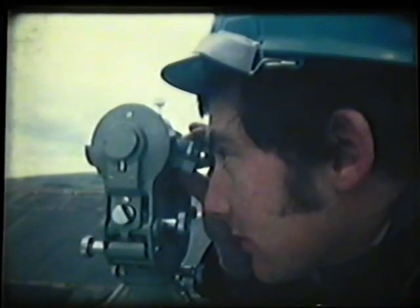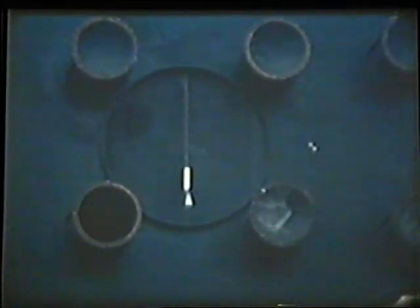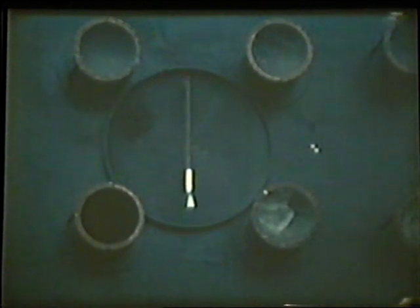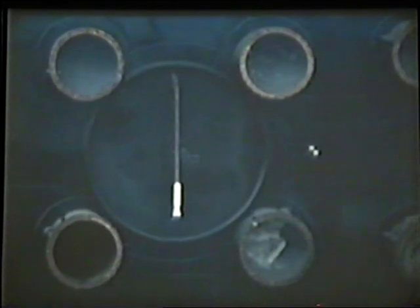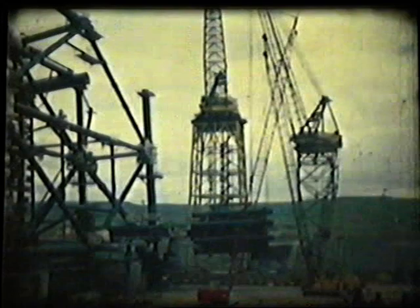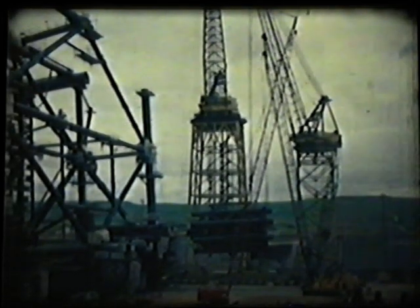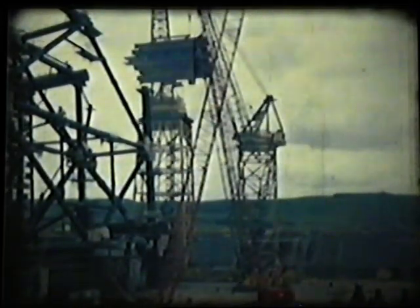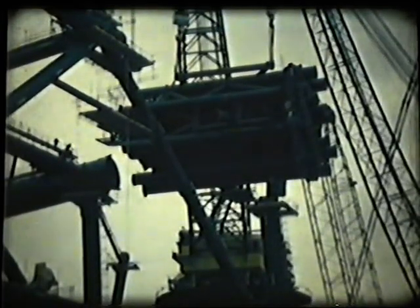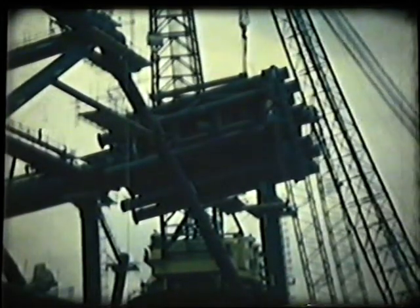Inclinometers set on the sides and ends of the load had to register within tight tolerances. And of course, the cranes had load indicators as standard equipment. Here, in a series of shots, is the main movement of the lift. At the top of the lift, the load had to be presented to the structure at the correct angle.